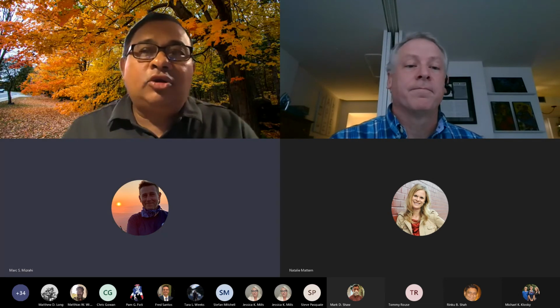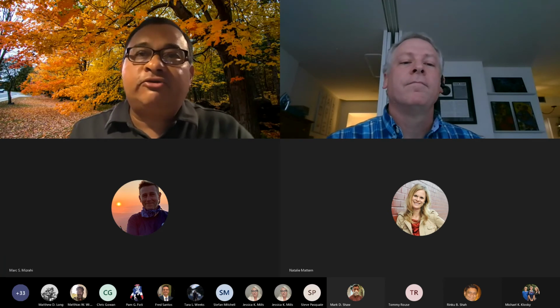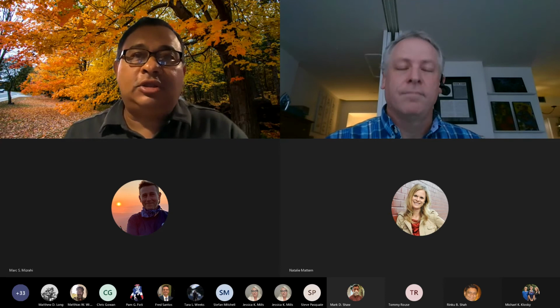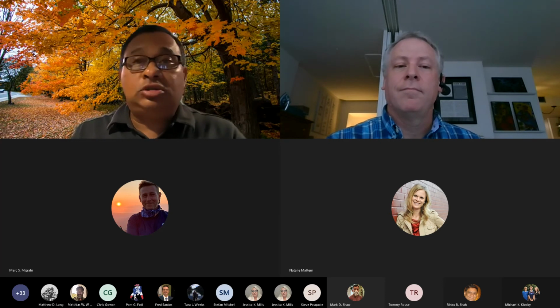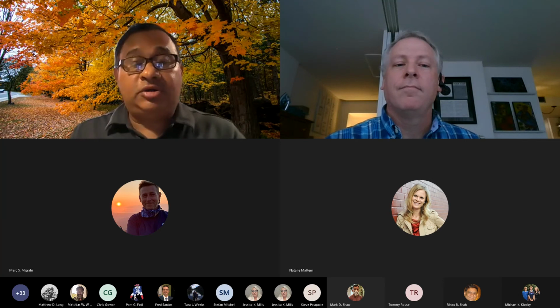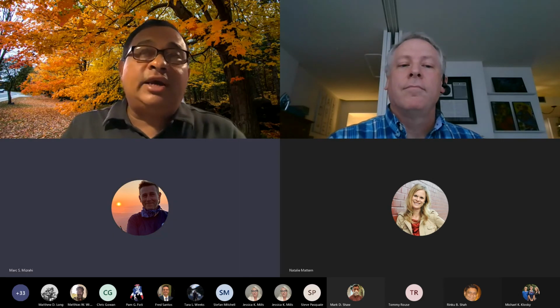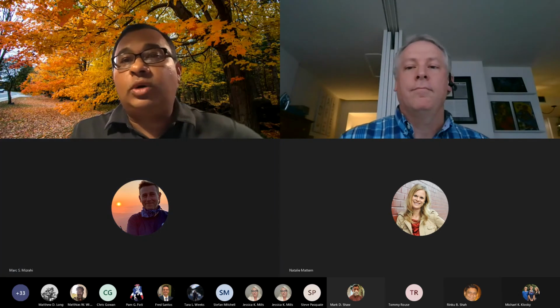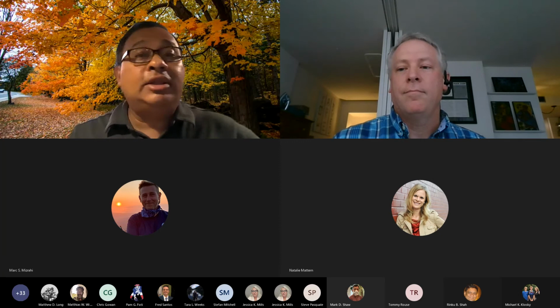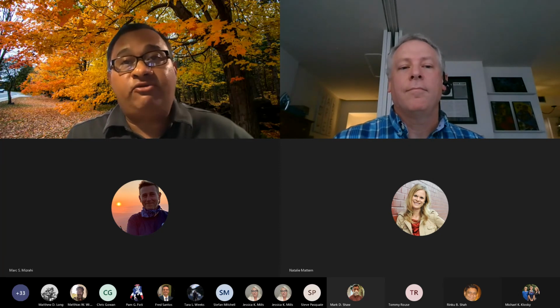Thank you. But real quick, Mark, I think we don't want people to think that, hey, we have to do it because of our ISO certification. The intent of this is that closeout is important. And I think everybody should dive into it, be it at the start, but certainly at the 80% mark, and then make sure that we have a checklist so that we are working towards that closeout goal. The part of the ISO is just to document that somehow, and it could be as simple as a one pager. There is no format for reporting it. As long as you do it and have some documentation, that's enough for an audit, I think.